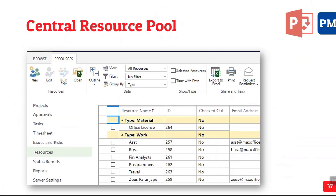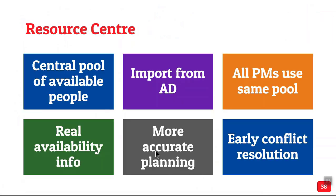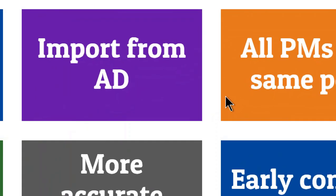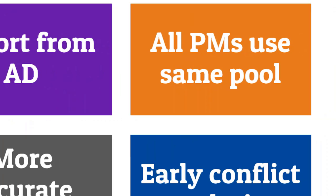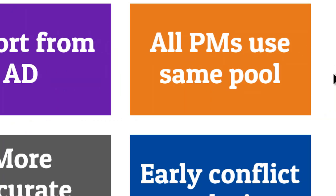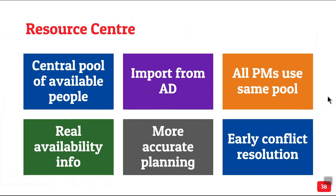Now, where do these resources come from? They can be imported from Active Directory in one stroke. You don't have to manually type anything. Having done that, you can add cost information, availability information and so on to make that centralized resource pool more relevant and up to date. Now, the best part is all project managers will use the same list of people to allocate work. So if there is a conflict, it will be understood much earlier in the planning stage rather than much later.